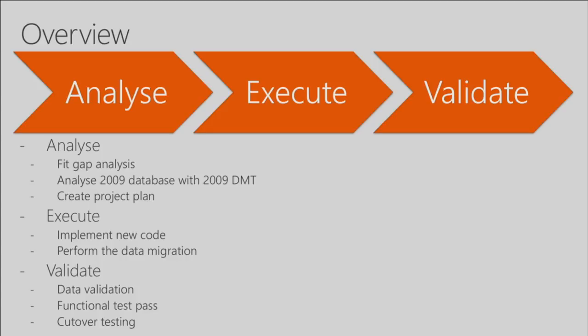We'd definitely recommend you have a cutover run book. It's a very detailed run book of what needs to happen, who's doing what, at what time. And that run book needs to be exercised months and weeks before your official cutover.